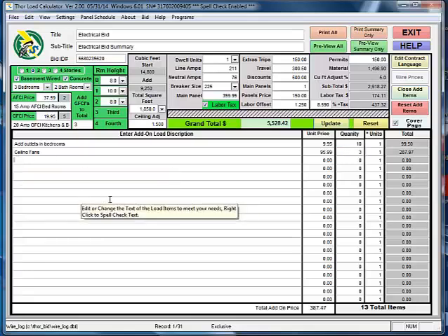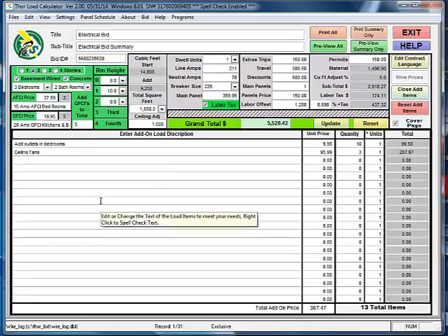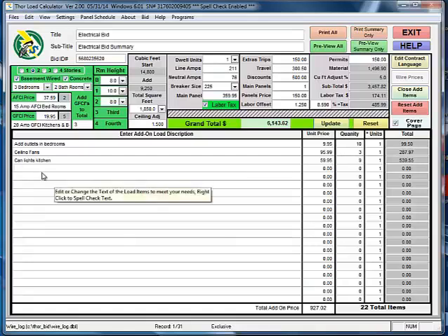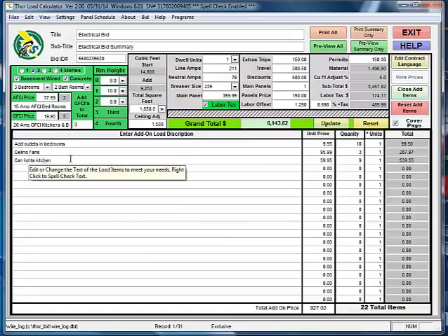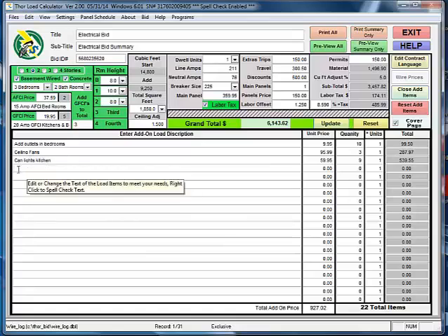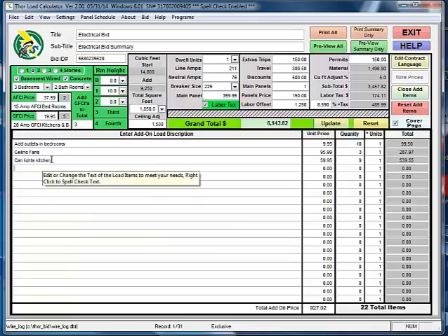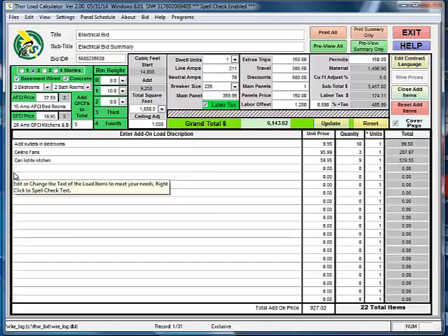Additionally, if your customer wanted you to add special lighting, say can lights for the kitchen, and the customer wants special light that costs $59.95 each, and the customer's wanting 9 of them, then that's now added to the total price of the installation, and on and on and on. Again, these things are outside of the NEC code requirements to add to the square footage. These are outside the NEC requirements to add to the panel size. These are simply items that the customer wants that don't affect the calculation of the panel size.